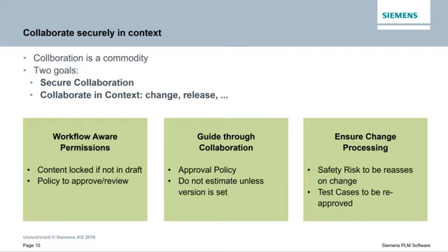The second topic was collaborate in a context. By the context in the software development process, we typically mean a context of a release or a change request. So it means that for every change, you should see that all the necessary changes are really linked to a given change request. So you can really ensure that for whatever the people are doing now, with the specification, with the requirements, with the backup of the user stories, all those changes are really linked to the high-level business or change request.